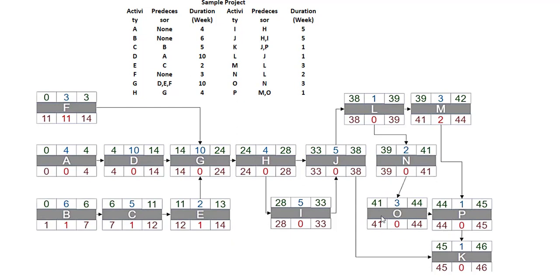As you go on filling these activities, calculating all those below factors, what we get to know is some of our activities, like in this case, D has taken lot of time and hence we can delay activity E as we get buffer in these both activities. So E, C, B and F have buffers, that is E will have buffer of 1 day, whereas F will have buffer of 11 days.